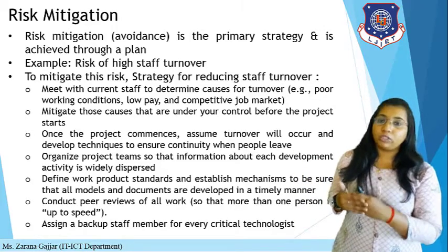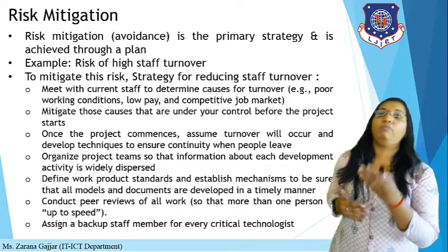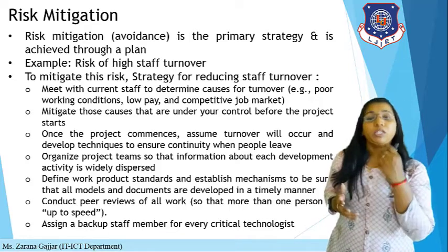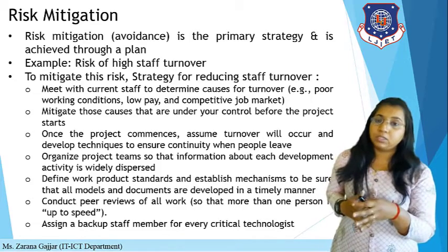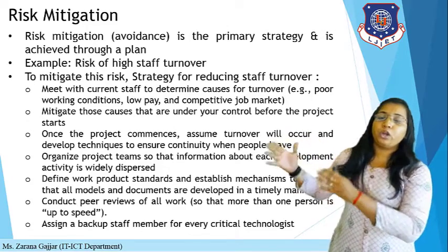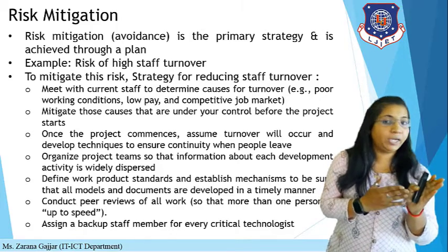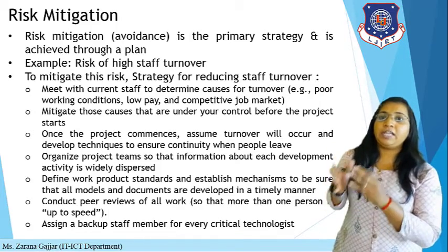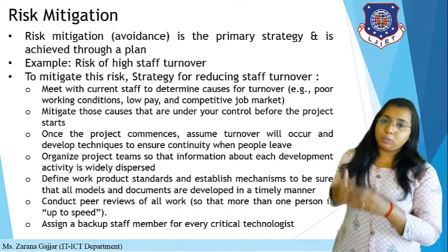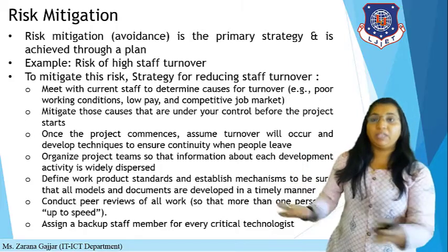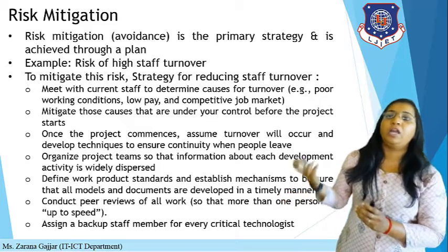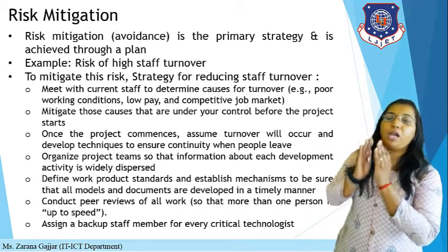Then once the project commences, assume turnover will occur and develop techniques to ensure continuity when people leave. So if any employee still leaves the company due to some emergency, then you have a backup plan that you can easily adapt, so the development of your software product continues. Then organize the project team so that information about each development activity is widely dispersed. You have to communicate with each team member, then define work product standards and establish mechanisms to be sure that all models and documents are developed in a timely manner.